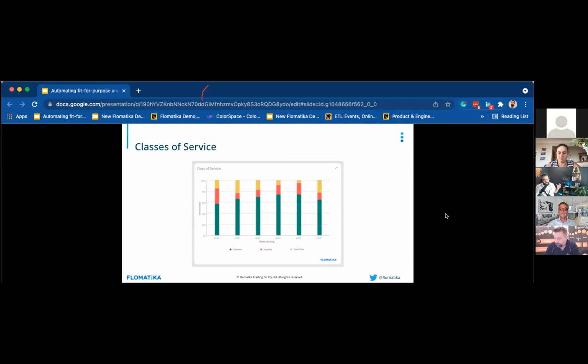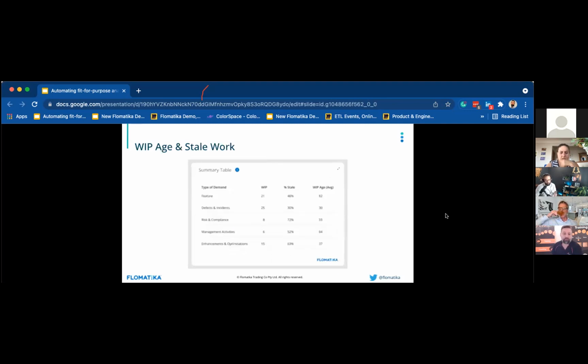It might be that your system is operating in a state of urgency, nothing is delivered and everything gets expedited, and then people start only acting on the expedited, and then you start degrading the whole system, you know. But that's invisible, right? If you can have a visual representation of that, then that can allow the right conversations to take place.